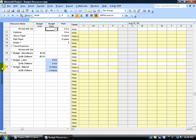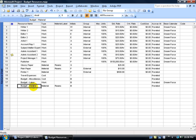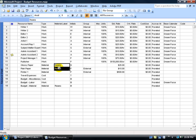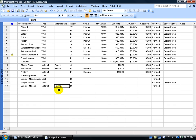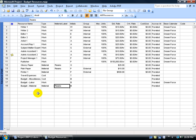I'm keeping track of the two paper materials but not setting a budget for the printer material. You can handle this one of two ways: if you want to track all materials collectively, get rid of all the labels. If you want to track reams separately and also have budgets for other materials like pencils, pens, or hammers, go ahead and add budget resources for each with appropriate labels — like 10 pens to a group, or 400 sheets per ream for glossy paper. Otherwise, remove all labels and have them all under materials.